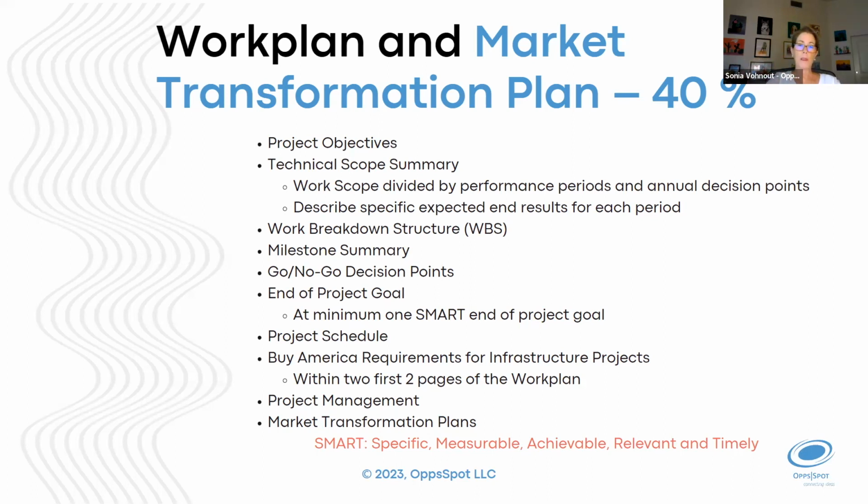And so in the work plan, again, think about this systems engineering approach. What are your objectives and how are you going to do the work? So what's going to be that task breakdown and your milestones? And for this FOA, the DOE also wants you to have go, no go decision points. Don't get overly complex here. Recommendations, at least one per reporting or budget period.